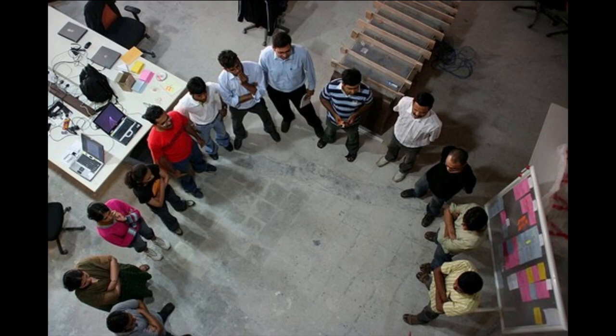So you might stand around in a circle and what you do in a daily stand-up or Scrum meeting is you do the rounds and everyone shortly announces, not discusses in depth, just announces what they are going to do. Or more precisely, what they did yesterday, what the current problems are and what they are going to do today. And the purpose of that is that the others know what you're working on and can decide whether this relates to their work and might imply that they need to talk to you because there will be touch points. So it's pure announcement, not discussion. And if there are interactions that you need to talk about, you will do that after the meeting. You will not block everyone from finishing or leaving the meeting because you start a discussion in the middle.